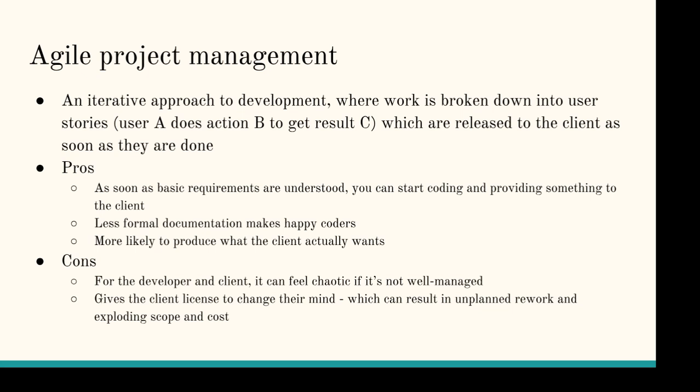negotiating or dealing with that situation and saying, okay, what I'm hearing you say is you want these additional things, but we've already planned work for the next sprint, and these are the things that we're going to do. If you want to do these additional things, we either need to push the schedule out, or we need to take some of these other things off the list. What do you want to do? You tell me what you want, right?